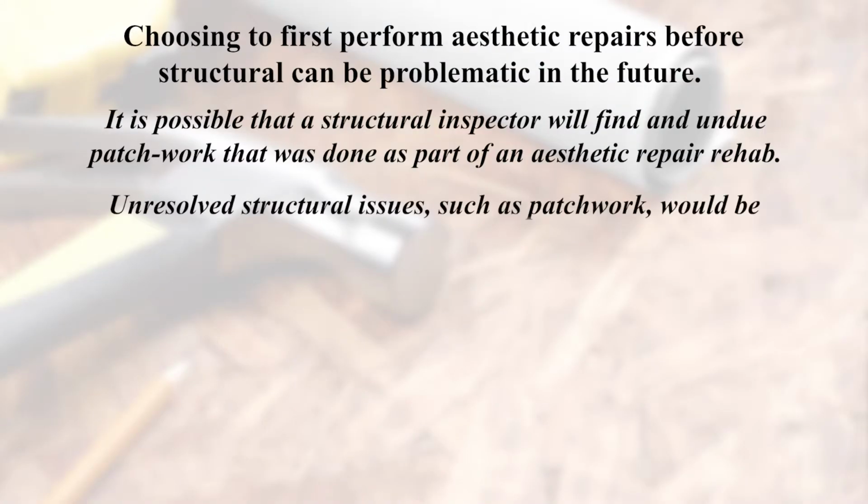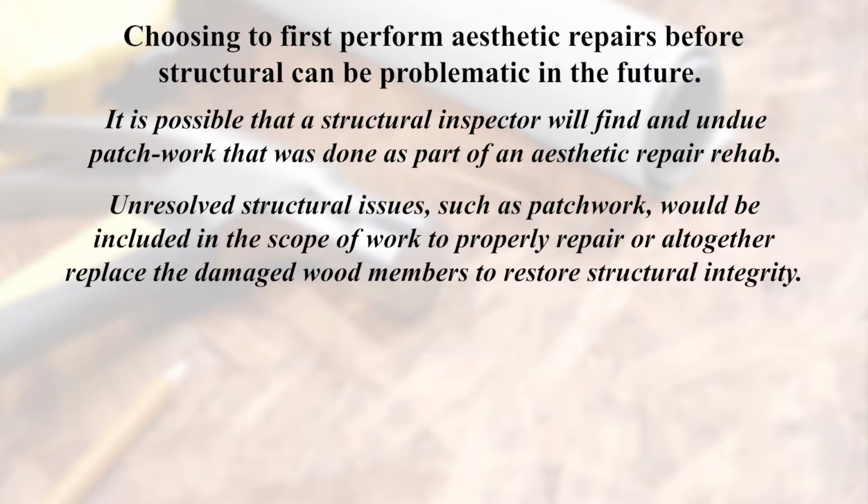Because in an aesthetic repair program, some structural integrity issues are patched over, a structural inspector that inspects the property will likely find and expose patchwork previously performed. Unresolved structural issues, such as patchwork, would be included in the scope of work to properly repair or altogether replace damaged wood members to restore structural integrity. This creates redundancies and unnecessary costs where you would essentially pay to have the same issue addressed twice. Once for an aesthetic lift and then again to regain structural integrity.